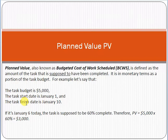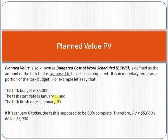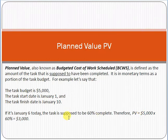Here's an example. The task budget is $5,000, the task start date is January 1st, and the planned finish date is January 10th. If today is January 6th, the task is supposed to be 60% complete — because 6 days out of 10 have passed. So the planned value is $5,000 multiplied by 60%, which equals $3,000. That means $3,000 worth of work should have been completed by January 6th.